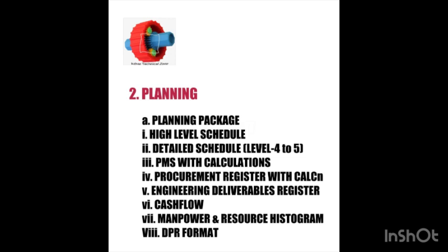PMS with calculation, PMS here being the progress measurement sheet. Then you have to prepare the procurement register with calculation, the engineering deliverable register, and the cash flow. Cash flow is nothing but the amount which you are going to claim for the coming months.